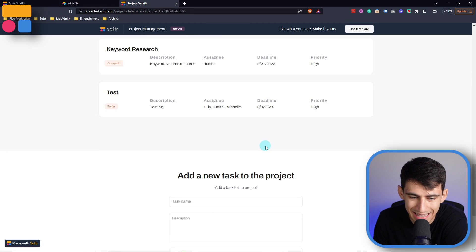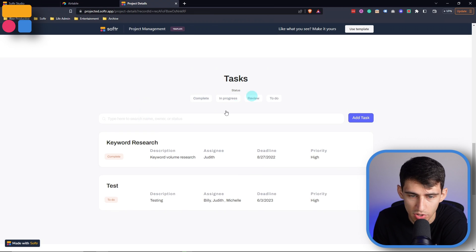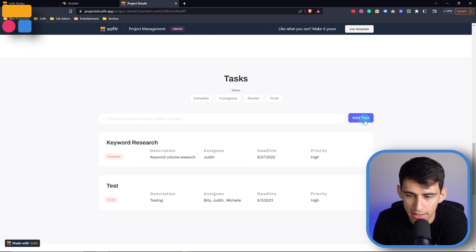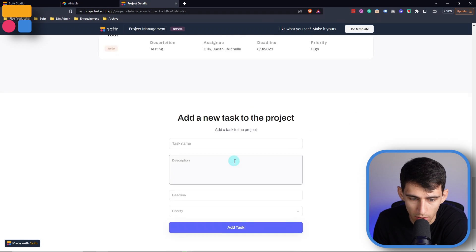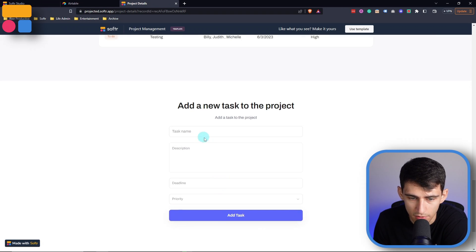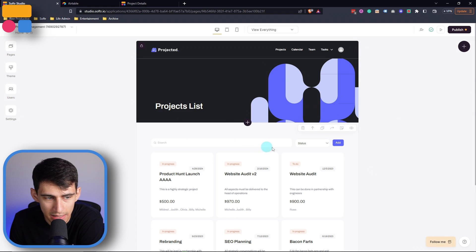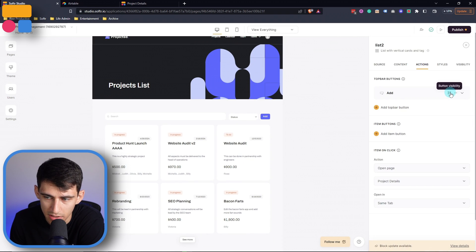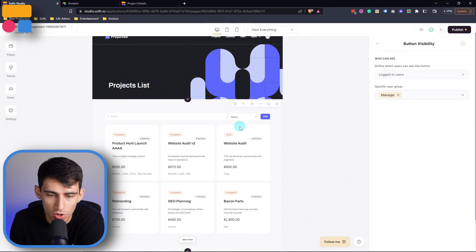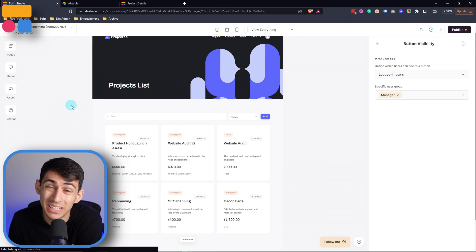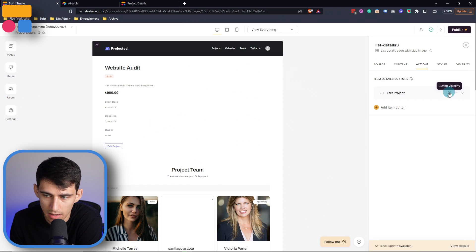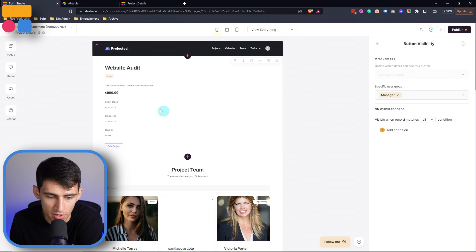At the bottom, we see the specific tasks associated to this project, and we can add new tasks by clicking here or by typing into the form. In the backend, on the homepage under actions, the button visibility shows that the only way to add a new project is if you are a manager — employees can't. And in the project details, the edit button for the project is also only for managers.